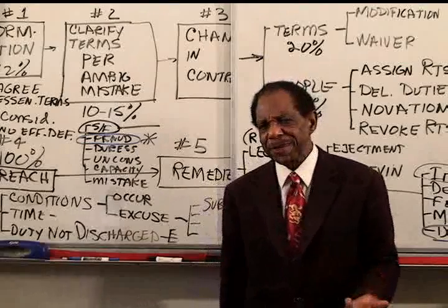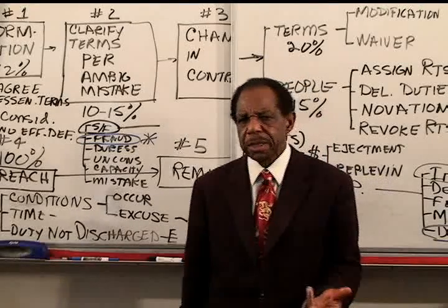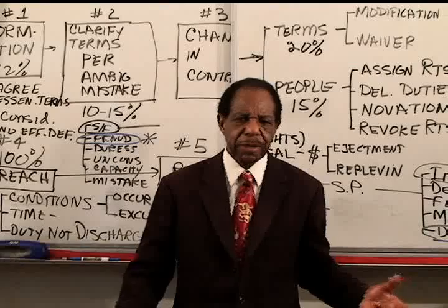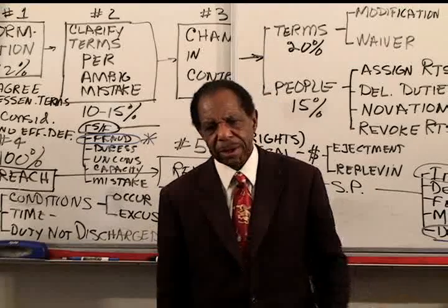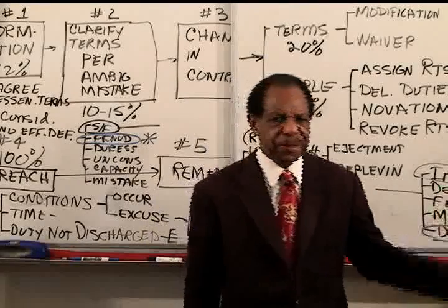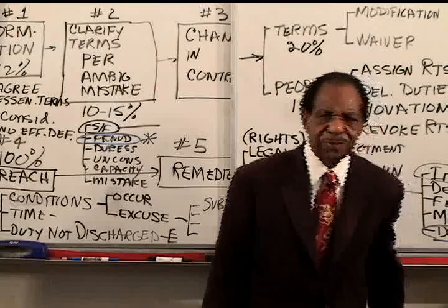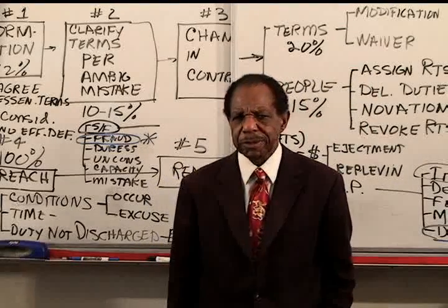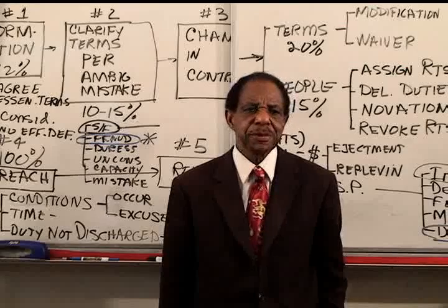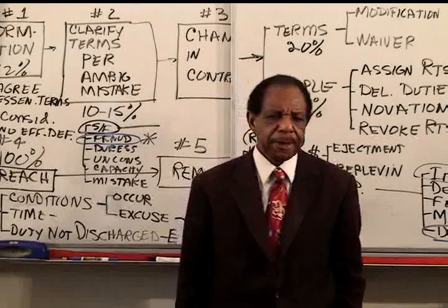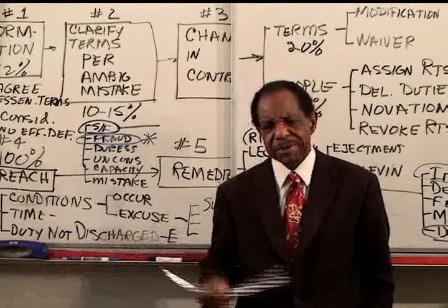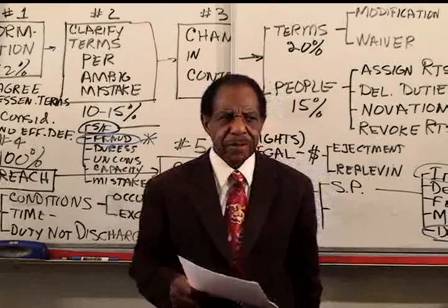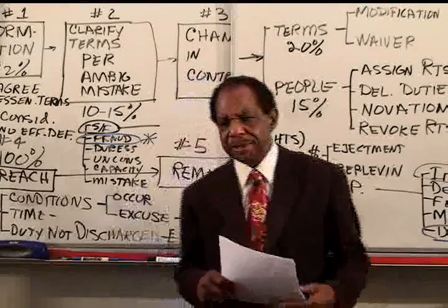When it's not fancy taste, it's just functional, and I want the thing to function. I want you to repair my car so it functions, repair my plumbing so it functions. If it's just functional, then that's all it has to do, is to meet the functional utility. In this case, shingles matched, there is an industry sort of concept of what matching is. They either did or did not meet that standard.